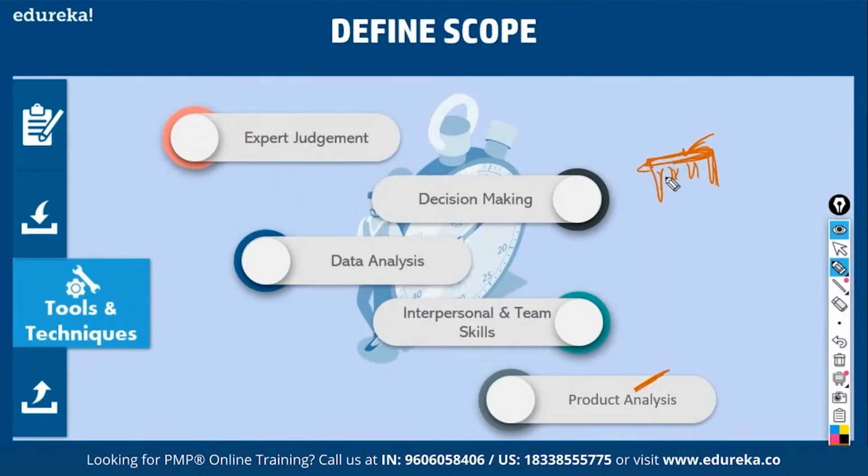So you break down the product into smaller and smaller components and you understand what value each of these product components contributes and what is the rate at which you can buy without compromising on quality. That is, you have to maximize value, minimize cost without compromising on quality. This is what is called product analysis. Some people call it value engineering, systems engineering, functional analysis. Whatever it is, you have to do all this in order to define a product.